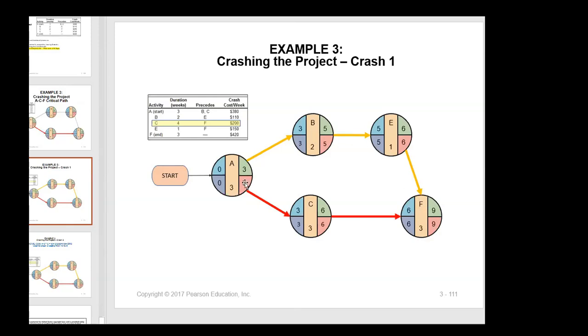Okay, now this doesn't always happen. In this case, it happened that now we have two critical paths. Because 5 minus 5 is 0, slack times are all 0. 0, 0, 0, right? So one critical path, two critical paths. Remember, the method says when you have multiple critical paths, you must crash on each critical path and crash the activity with the lowest cost.